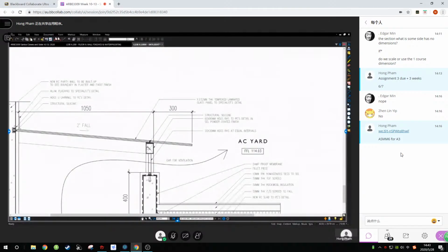So like what I said just now, when you describe these items, are you going to merge the supporting structure and the covering in one item? If you merge them in one item, you need to say that this glass is fixed to and including the supporting structure.